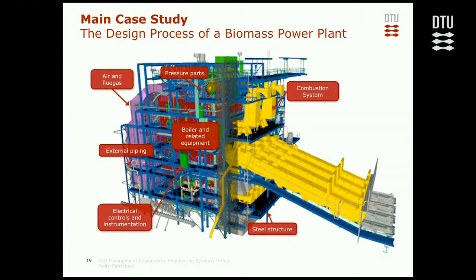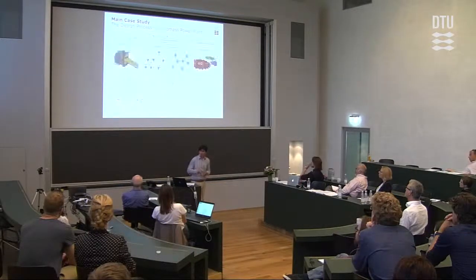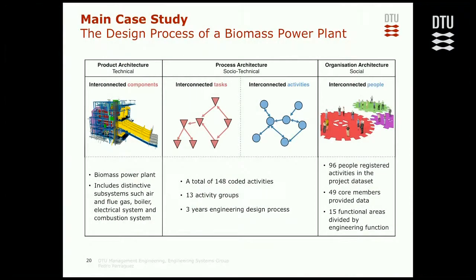Then I moved to my main case study: the design process of a biomass power plant, where the whole plant is in reality several subsystems designed semi-independently in different teams that sometimes have overlapping membership. In terms of what we saw before, we have the product architecture — things like air and flue gas, boiler, electrical systems, and combustion systems. On the organization architecture, in the main database there were 96 people registered; 49 were considered core members and provided data ending up in a registry of 77 people in the full survey, with 15 functional areas divided by engineering function. At the level of the process, I have 148 coded activities, 13 activity groups, and roughly three years of engineering design process.